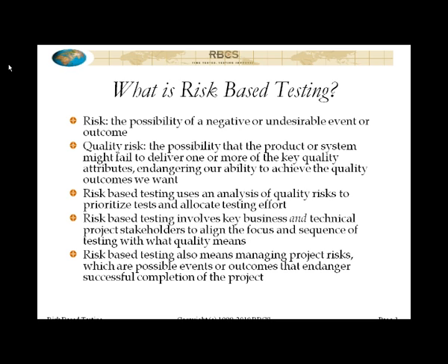Now, risk-based testing also looks at project risks, but no more than any other form of testing really should. Any other strategy of testing should also look at project risks. Now, it's important to be able to distinguish between a project risk and a quality risk. So, as I said, a quality risk could be something like system responds too slowly to user input, or system calculates incorrect total for shopping cart. Now, a project risk would be a bad thing that can happen that could endanger our ability to successfully complete the product, or at least carry out the project as planned.